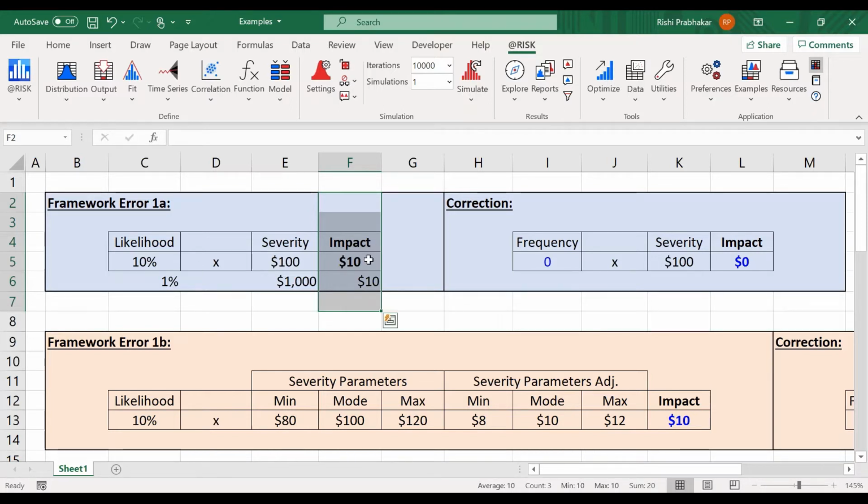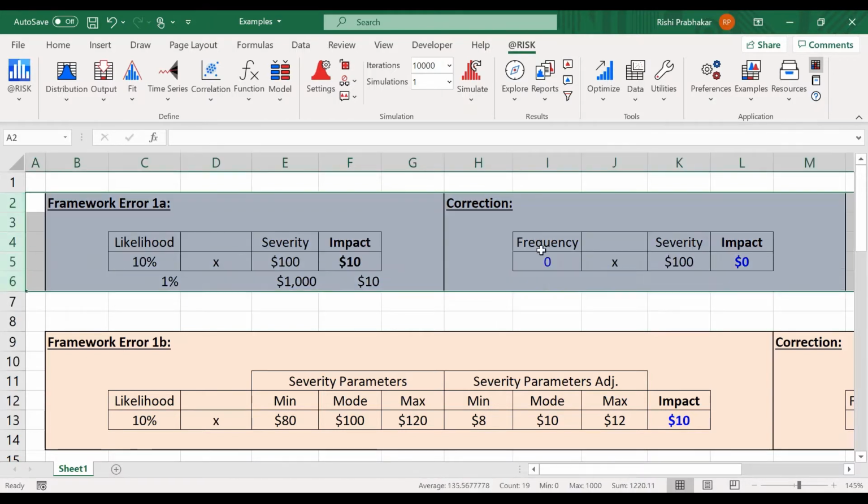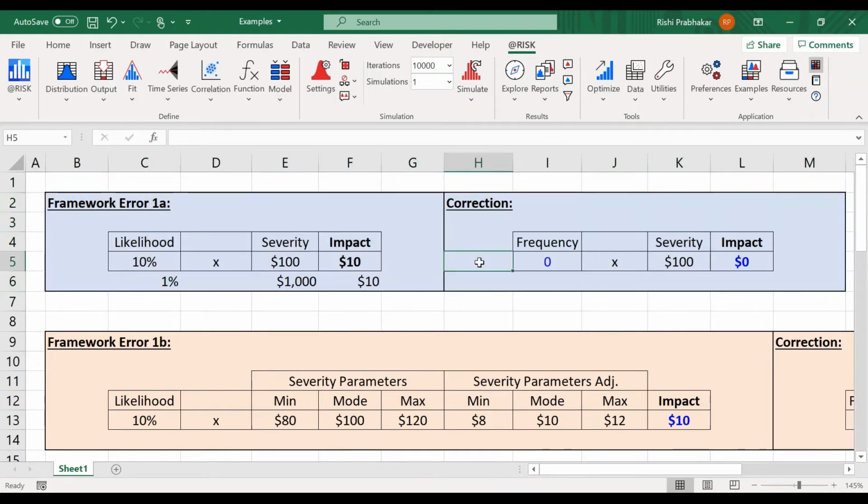So clearly there is a whole bunch of intuitive issues with this idea. What's going on? What's the problem? I need to be able to model what will actually happen. Now, I do know this is a super simple situation, but this basic idea is super simple. You need to model what will occur. As your risks and world get more complicated, we need more and more sophisticated models to handle it, but we are always going back to that single fundamental idea. You need to have a spreadsheet that produces data of actual potential outcomes.